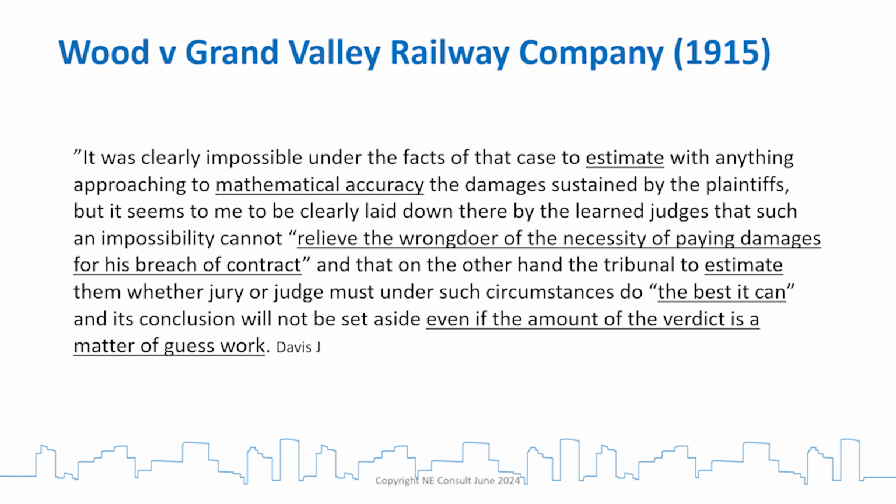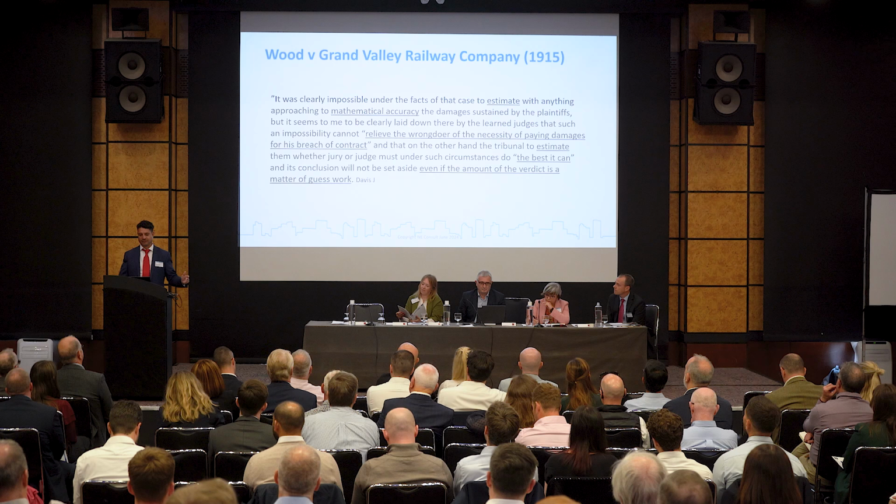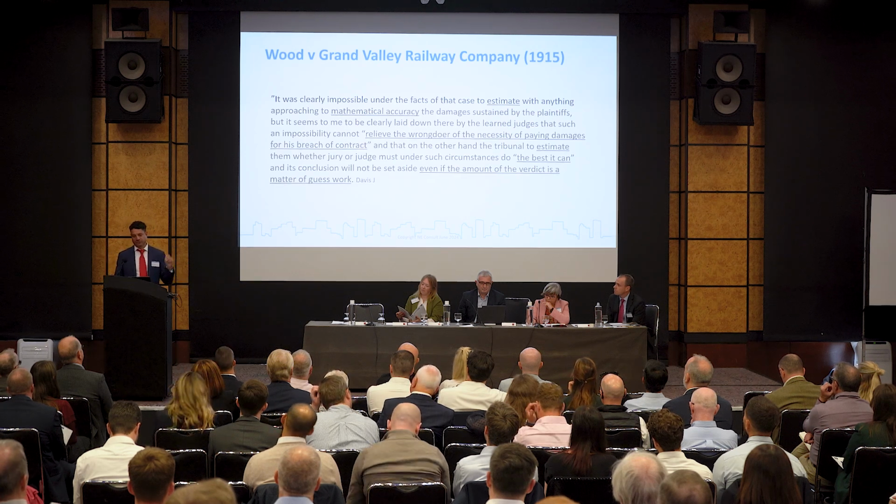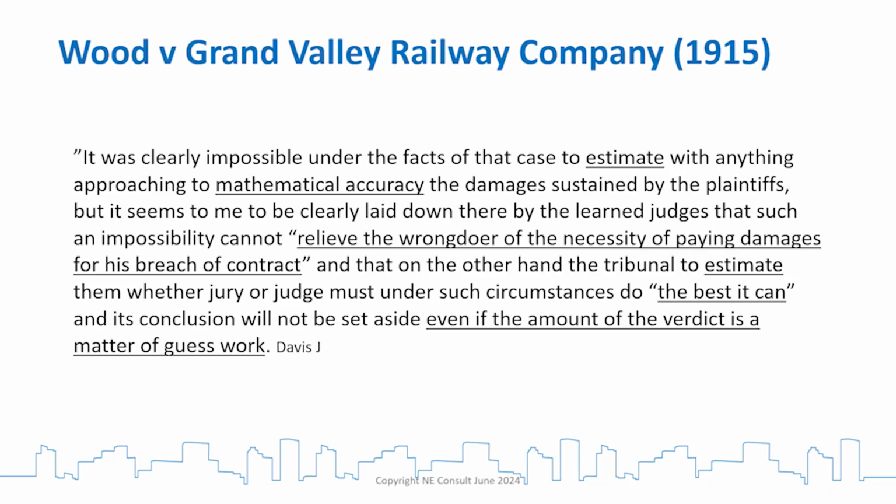Now, going back further to a Canadian case, because sometimes it ends up where, for the want of evidence, we don't pay somebody. The easiest way to not pay for something is to just ask for more information. "You've not justified it" is my favourite bugbear. "I need all of the information before I can make a decision here." In this case, you can see what's happened. And what they're saying is, look, it might be difficult, but that does not relieve the employer of their liability to pay.